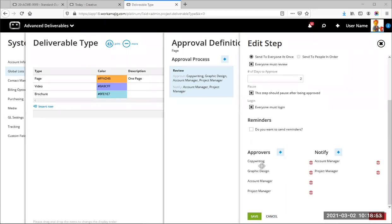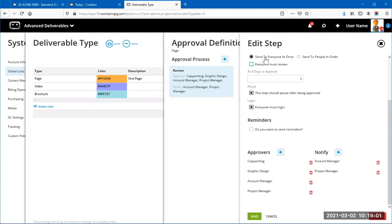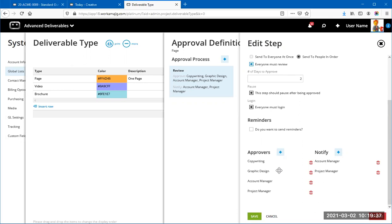The 'Everyone Must Review' option interacts with the send order. With 'Send to Everyone at Once' and 'Everyone Must Review' checked, if three of four approvers approve but the fourth never responds, the round will never complete — though you can manually skip that person if needed. If 'Send to People in Order' is chosen without 'Everyone Must Review,' and the first person rejects it, the remaining three never see it until the first person approves.